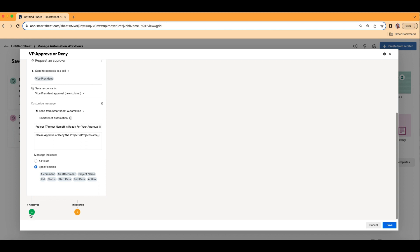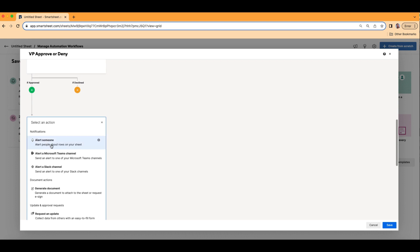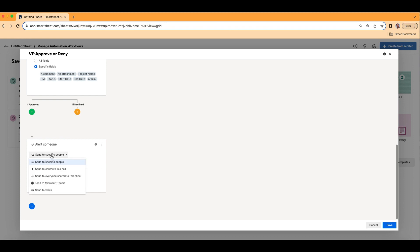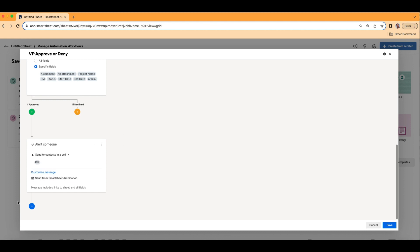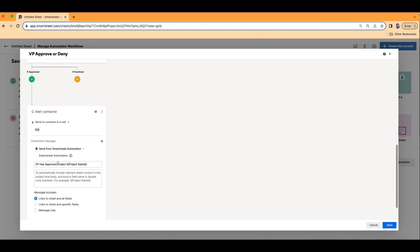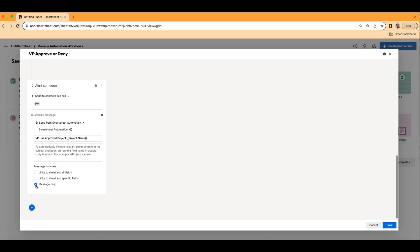The next thing you're going to want to do is you need an action item if they approve it and an action item if they decline it. Let's start with the approval — I'm going to click the green plus here and add an action. So if they approve it, maybe I want to alert the PM. You can build automation upon automation — they can just keep going. So if it's approved, we want to alert the PM. I don't want to send to a specific person; I want to send to somebody in the contact. Let's choose whoever is in the PM row and give it a title: VP has approved project {{Project Name}}.